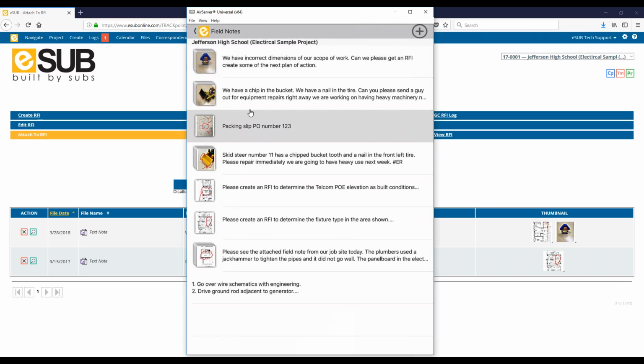There's not too much behind it. You go in there, you take your pictures, you take your notes, that streamlines into the office, and you can see how within 5 to 10 minutes, we're easily able to take those notes and pictures, send them back to the office, get an RFI created, send it off to the person that we need to, and we've streamlined that within 5 to 10 minutes. So big advantage to your company, documenting what's going on, taking those images, and of course, making sure you're using these field notes to your fullest advantage.